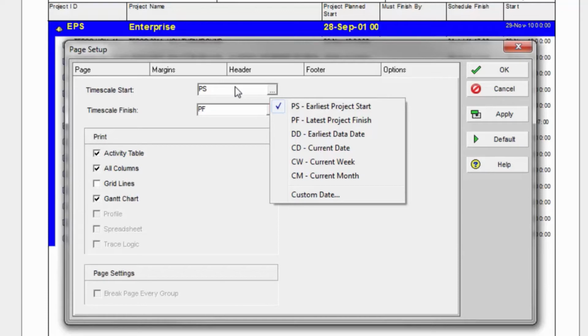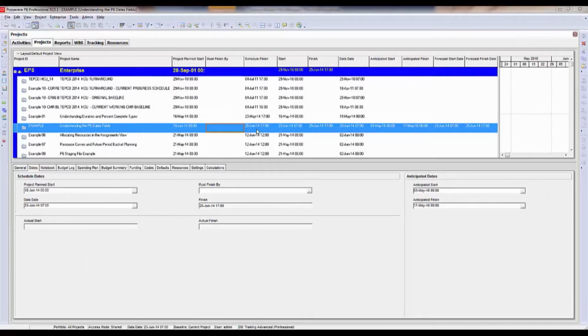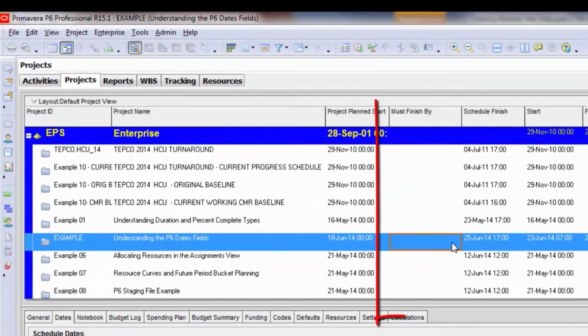because if it's not correct, you may run into a situation where you run the report, but you have numerous blank pages to the left side of the report on the time distributed part of the report, and that is probably a result of your project plan start date not being correct. I try to keep the project plan start date in sync with when my first set of activities are going to start.